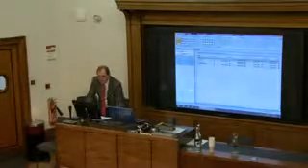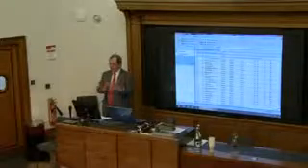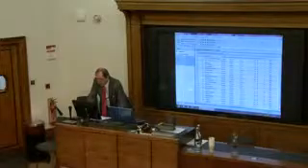So if I now go back into this one and click baseline durations, this, by the way, has shrunk because I've got a widescreen laptop and the projector has put it back into normal view. As I scroll across the plan, there's been no baseline durations, but in my revised baseline, it's showing me all the changes. So this is a very simple way of comparing a current baseline to a previous baseline and seeing where changes have occurred.